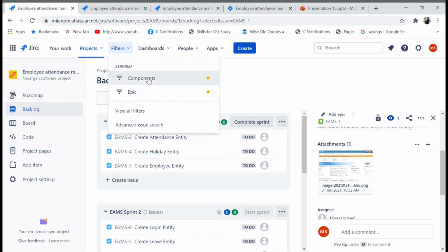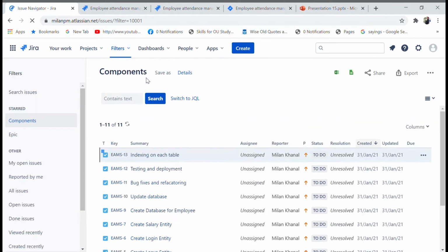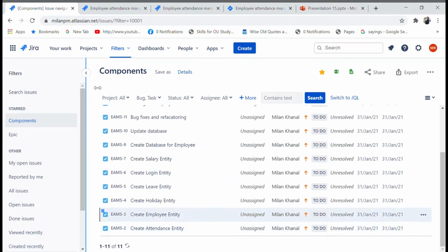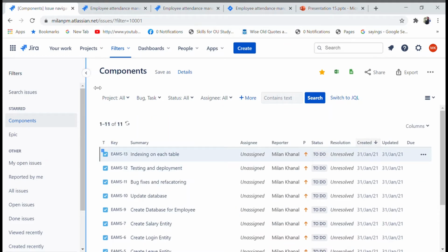In the component part, I have assigned it to the task and subtask, so you can always see the report of the components. If we are in a rush to see what things have been done in the task list, and what things are still on the task list, we can go by the filter, select the components, and select the tasks that are needed.